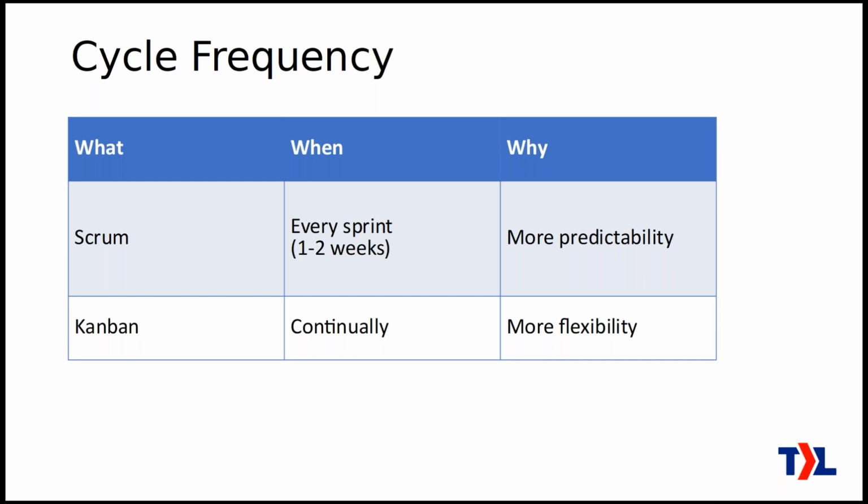The rough idea is that the team decides how much work they can take on in a certain sprint, whether that's a week or 2 weeks, and then they don't get bothered. They don't get any changes to that work for that period of 2 weeks, and then at the end they review, take on another chunk of work, and so it resets every 2 weeks.